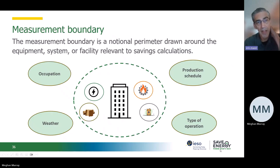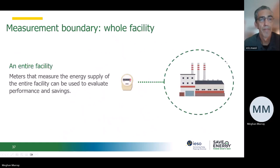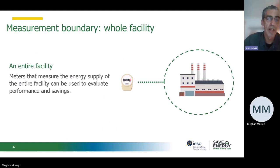Some basics of M&V: think about the measurement boundary — what is the system boundary? It's fundamental to science and engineering. One of the common choices of measurement boundary is whole facility. That's almost always the utility meter — the natural gas company has a gas meter, the electric company has an electric meter. There's data already available there that can be used for M&V purposes. We call that a whole facility measurement boundary.